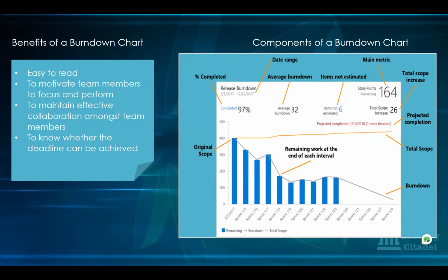It only works for teams that you've already coached and they understand what the burn down is telling them, that you can show that to during the sprint, and it will motivate them to work because they know that the way it's going, they might not make it. The only thing for a burn down where they don't have total understanding, that anybody can understand, is the projected one, because it's telling them projected completion is further than when the sprint ends.